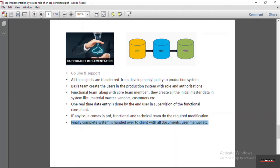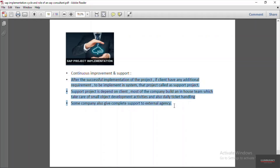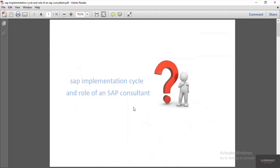Once the go-live is done, there is a phase of continuous improvement and support. During implementation, they initially decide to go with must-have functionalities, and some development is kept pending to be done after go-live. So continuous improvement and support is a regular activity. After successful implementation, the client often builds an in-house team to handle their support. Many companies also hire an external agency for regular supporting activities like upgrades, modifications, and new development. This is all about the SAP implementation cycle and the role of a SAP consultant in an implementation project.